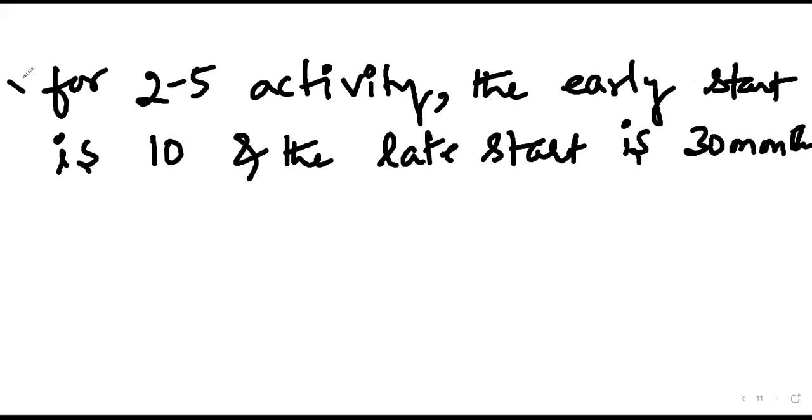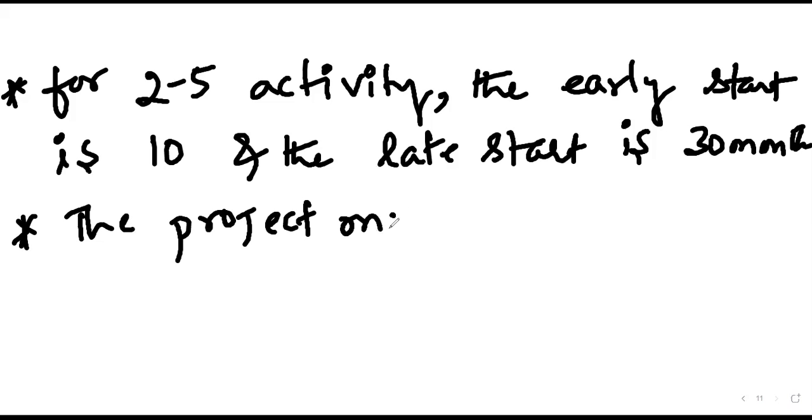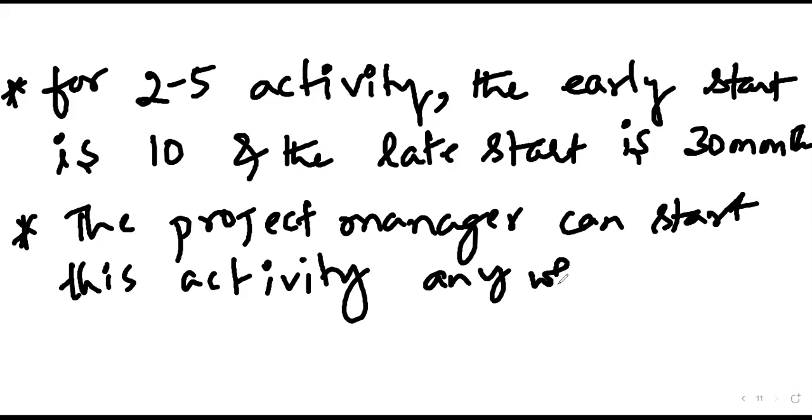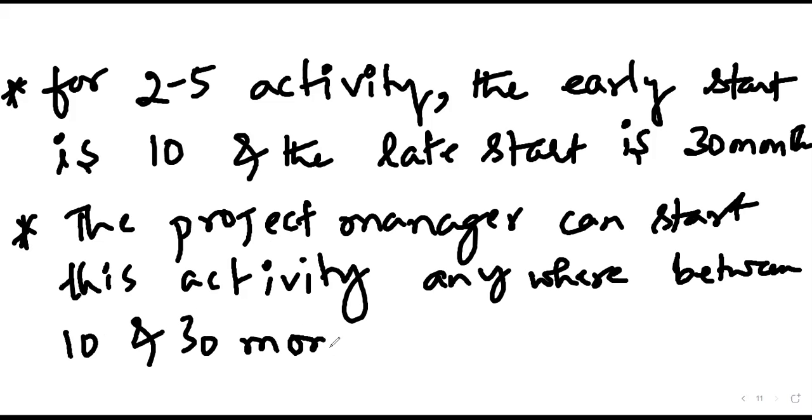So the project manager can start this activity anywhere between 10 and 30 months. Okay.